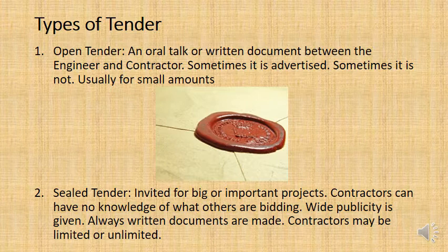The other thing I need to let you know is that contractors could be limited or unlimited, meaning that the invitation could be an open invitation for anyone to tender, or there could be a pre-approval where only contractors who you know are capable of carrying out this work are personally invited to submit their tenders, their bids for the work.